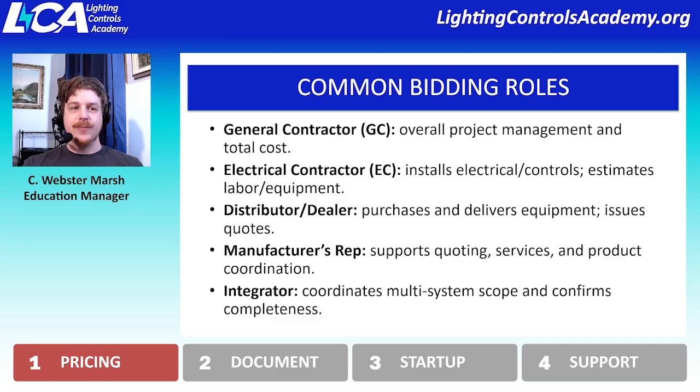But they will oftentimes provide a quote to the EC, bypassing the manufacturer's rep and distributor. Oftentimes, we'll also see that the integrator operates as a dealer, and so that's why it can sometimes just bypass the rep and the distributor, because they will actually be reselling the equipment to the EC, to the project, and provide the services to support that equipment at the same time. So that's the kind of simple difference between a distributor and a dealer.